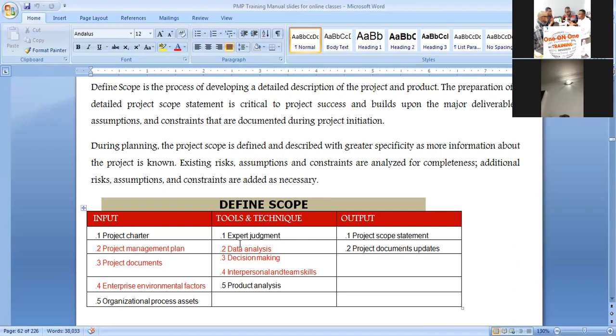So this is what you will flip into the future and tell the client, for our funding reconciliation, month 1, this is the financial milestone that is required of you. And chippings that is this amount in this month may likely be so and so amount in so and so month. Now we need 4 tons. So for this 4 tons, for instance, is $10,000. In the next 5 months, for that same 4 tons, we will need $20,000. In the next 1 year, for the 18 tons, we will need, that is how you project down.